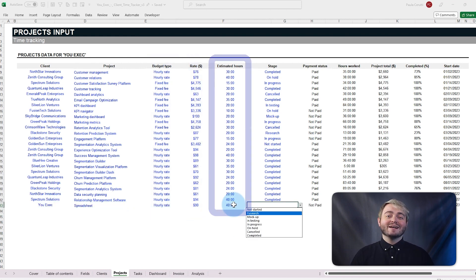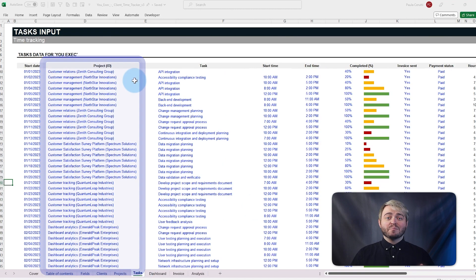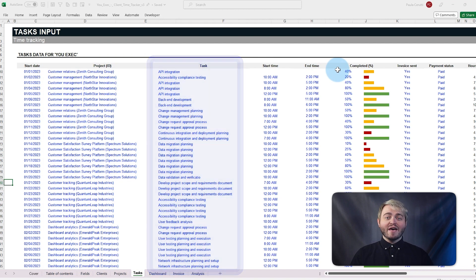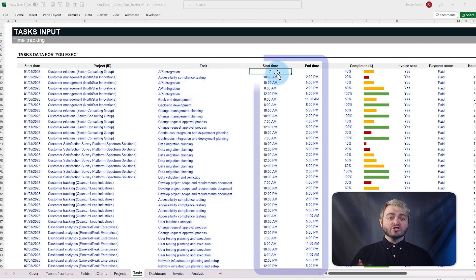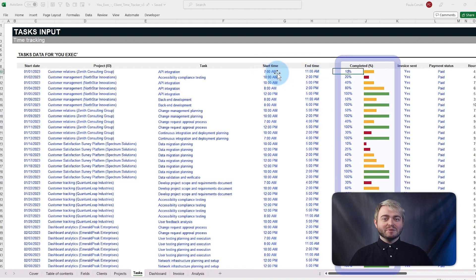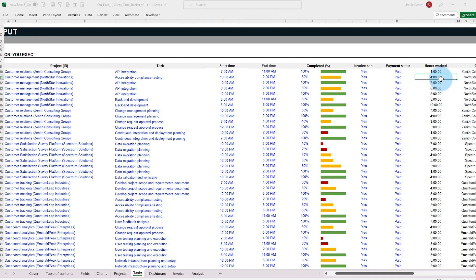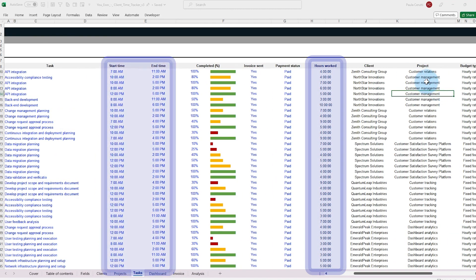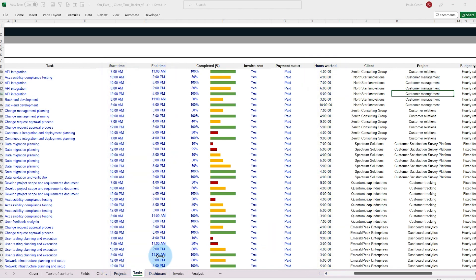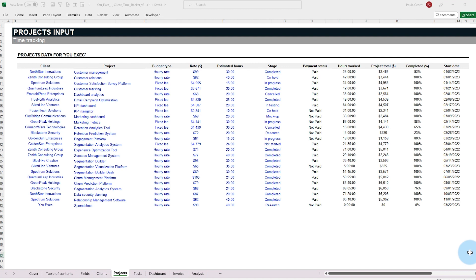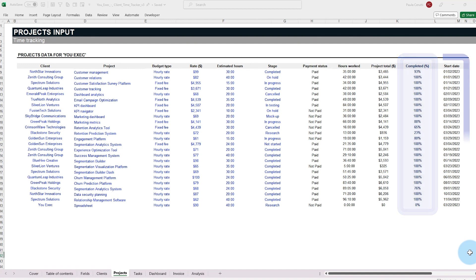To log hours worked, go to the tasks tab and select the project and the tasks you worked on. Then enter the start and end times and the percentage completed to track progress and calculate earnings. The total hours worked will be automatically calculated based on the hours logged and the total accumulated of the project will also be automatically calculated along with the payment status, total amount, progress, and date on which the project started.